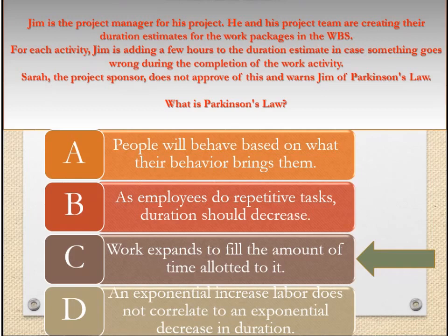Answer: C. Explanation: Parkinson's law states that work expands to fill the amount of time allotted to complete the work. If Jim allows 25 hours for a project team member to complete a 20-hour task, it will likely take the team member 25 hours to do the work.